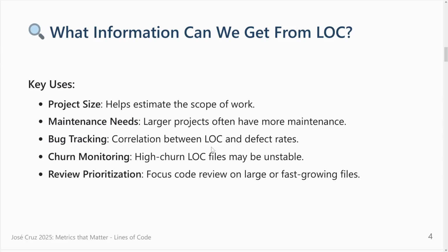So if you need 3 or 4 more months of development, and you develop in a linear way (it's not linear, we know, but imagine that it is), you can predict how many bugs are expected. If you cross that and ask the quality team, or even the developers, how much time they take to fix a bug, you start to understand how much time buffer your project will need to fix the bugs before the project is completed. Again, it's not a very precise science, but you can establish at least some confidence. Let's say you can trust the system 80% or so, which is quite good. It's better than having nothing, just guessing.